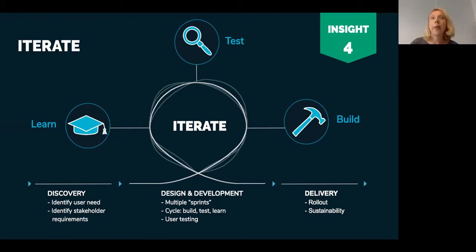Obviously, there is pure agile, and then there's agile that actually works within the context of the NHS. So we find that we meet somewhere in the middle, because what we find sometimes with our clients who are clinicians, they already have a very clear idea of what it is that they might want, which goes against the agile way of working. But we tend to meet in the middle, and just doing 2-week sprints allows us to make sure we're on the right path.